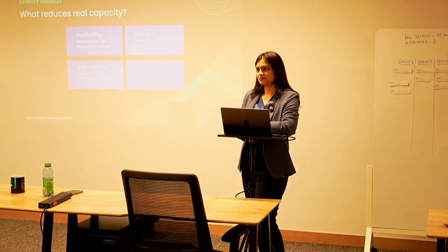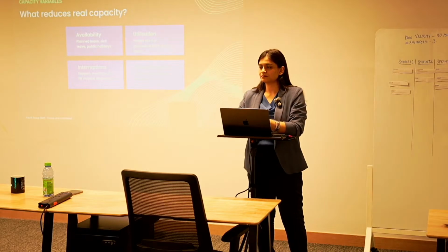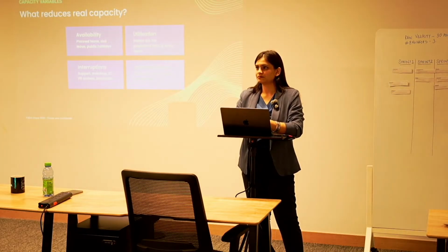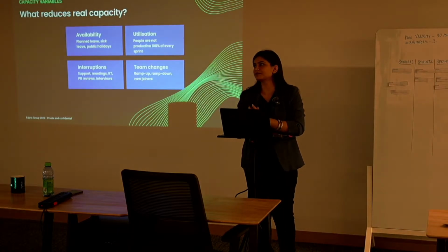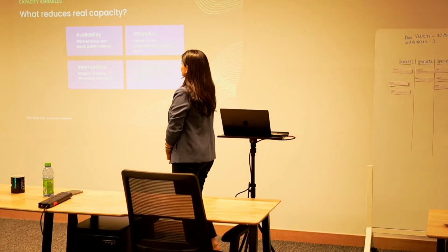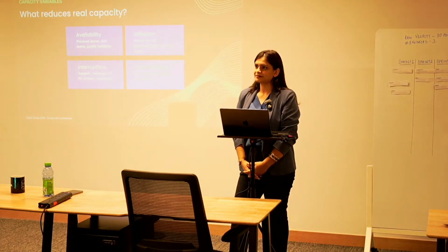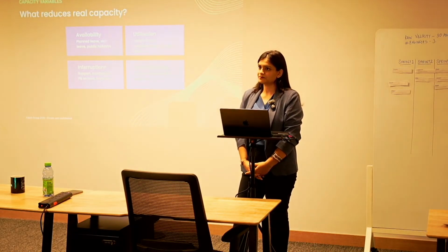And that is the amount of time that we generally don't accommodate as part of our release planning, which is very important because if you don't have your initial setup of the code base, you won't be able to go at the pace that we think we would. Because that trickles down and creates more problems for the developers in developing the stories, right? If you don't have a fixed structure, you won't be able to work based on whatever your initial thought of that velocity or story points was.